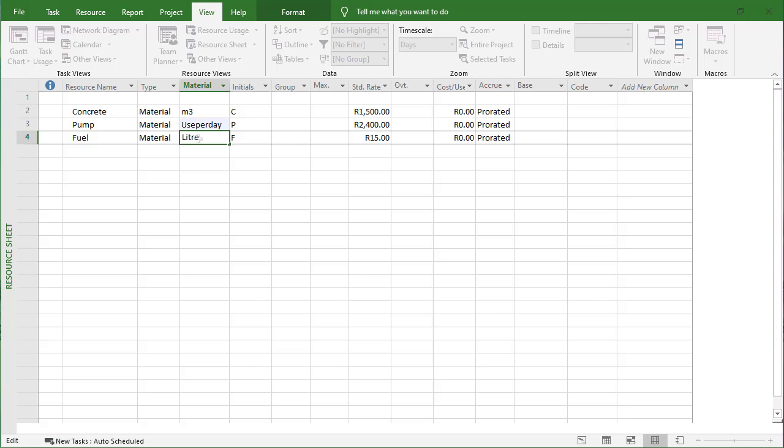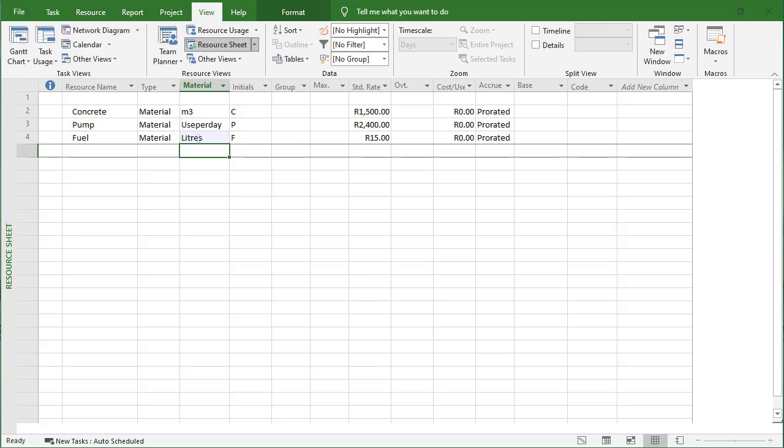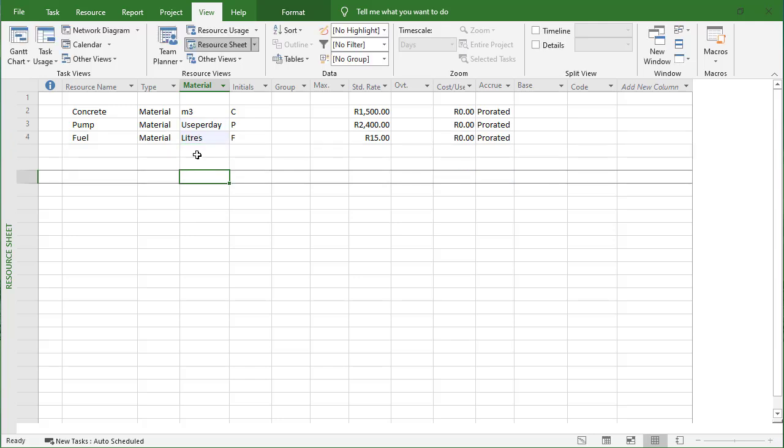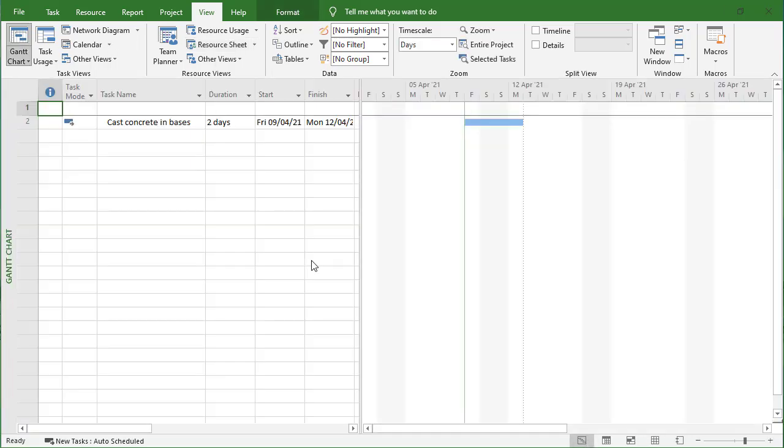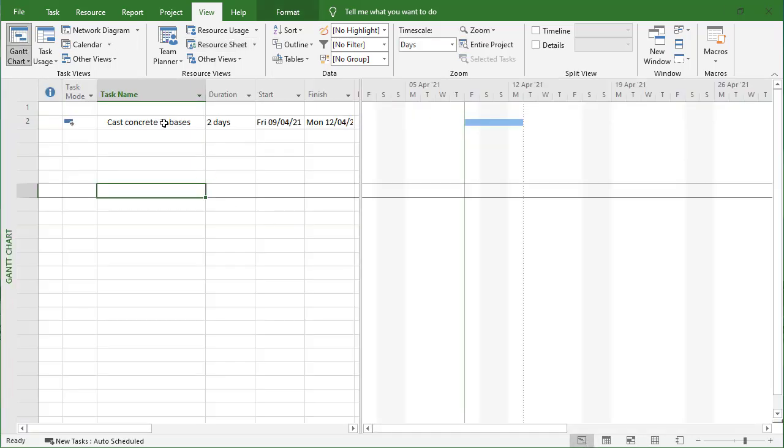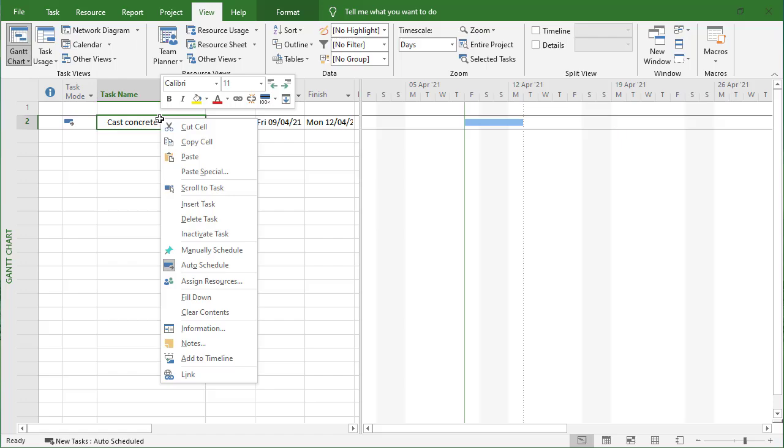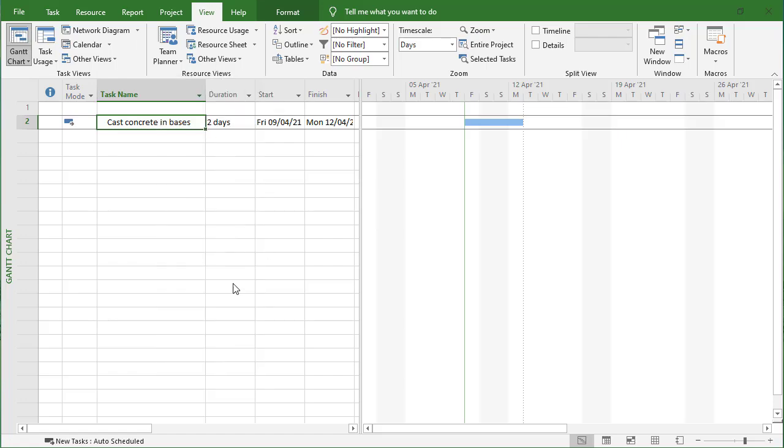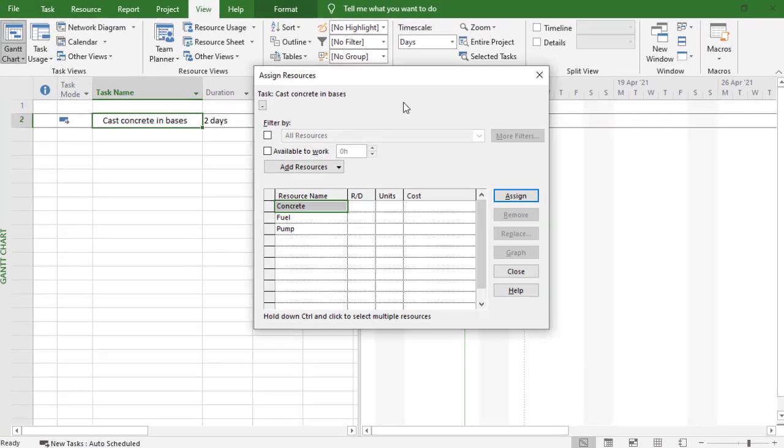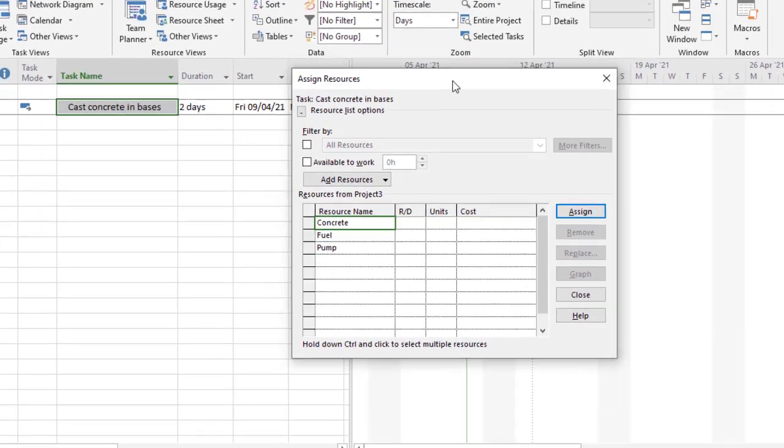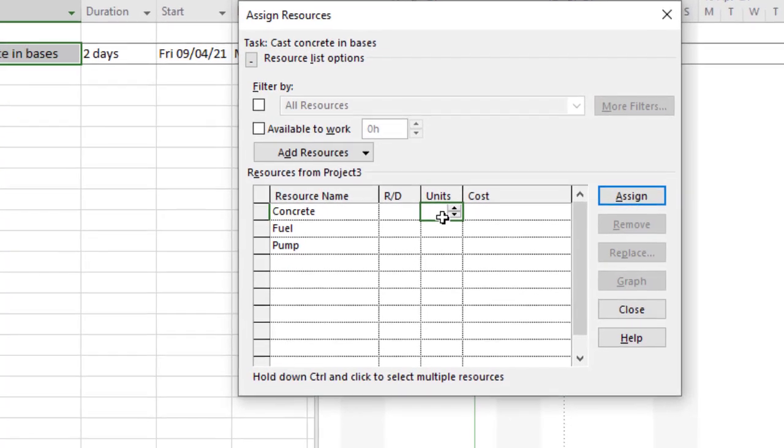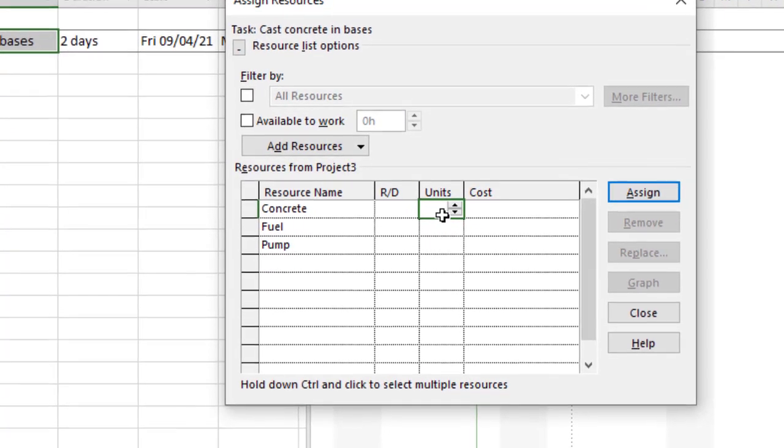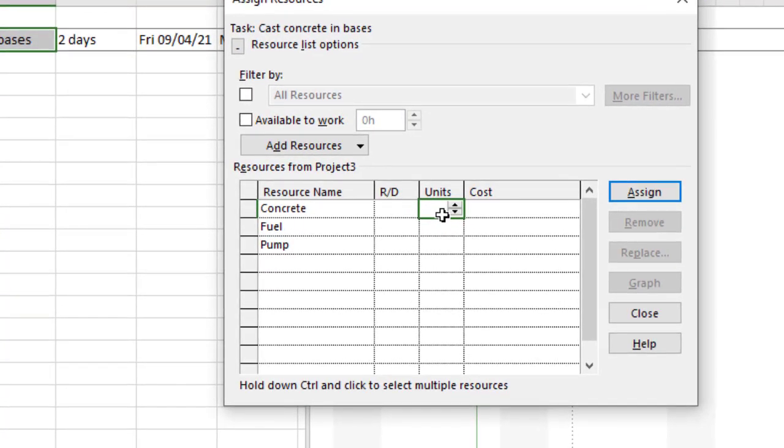Those are my three resources and I'm going to assign them now. In the assignment I'm going to show you how to create a variable resource. Let's go back to our Gantt chart view, right click there and go to assign resources. For the concrete we're going to say 40 cubic meters.